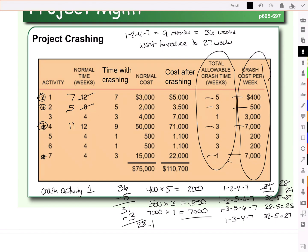Well, what's the total cost to our business of speeding up these activities in our project? It's the $2,000 plus the $1,800 plus the $7,000. So the total cost to the business is $10,500. What do you charge the client, that individual who's buying the house from you? Well, at least $10,500 plus your profit margin. Now notice there's a big difference between crashing to 28 weeks and crashing to 27. So it kind of shows you the point at which it gets a lot more expensive to speed up the project.